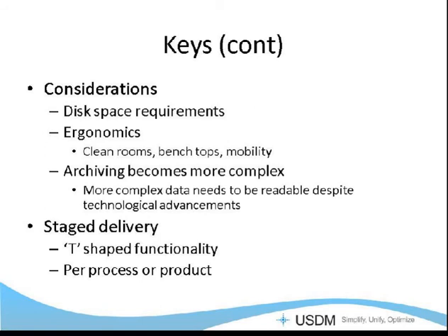You also might want to consider a per process or product implementation so you can focus the efforts and people do not get overwhelmed with a cutoff date where one day you're on paper, the next day you're in the system and it has to work. If you focus on one area, you can perfect it. You can set it up so your process is ideal the way you want it, and then learn from that and apply what you've learned to other processes and continually improve.